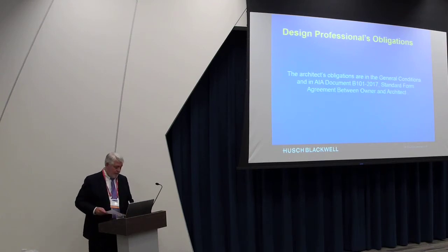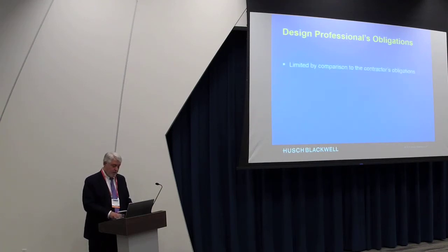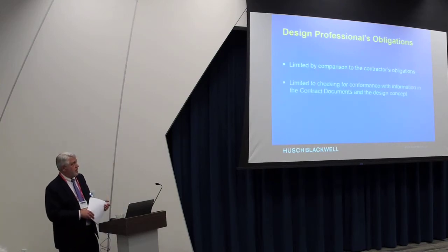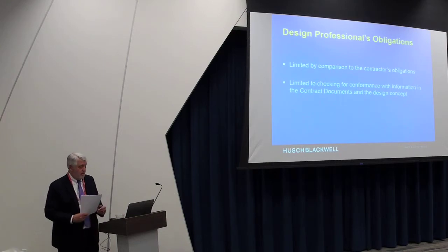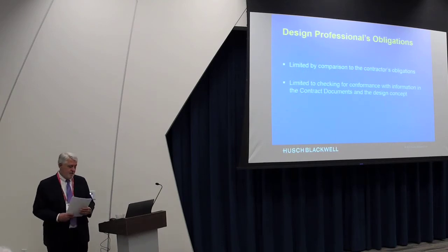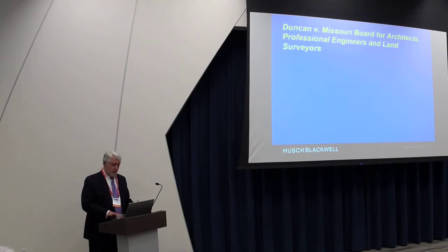Okay, let's talk a little bit about the architect's obligations. Then we'll get into a little bit of case law here. It is much more limited compared to what the contractor's obligations are. And this is the language you always hear. You're only looking for conformance with information in the contract documents and the design concept. So it doesn't put you under the obligation of looking at it in great detail.